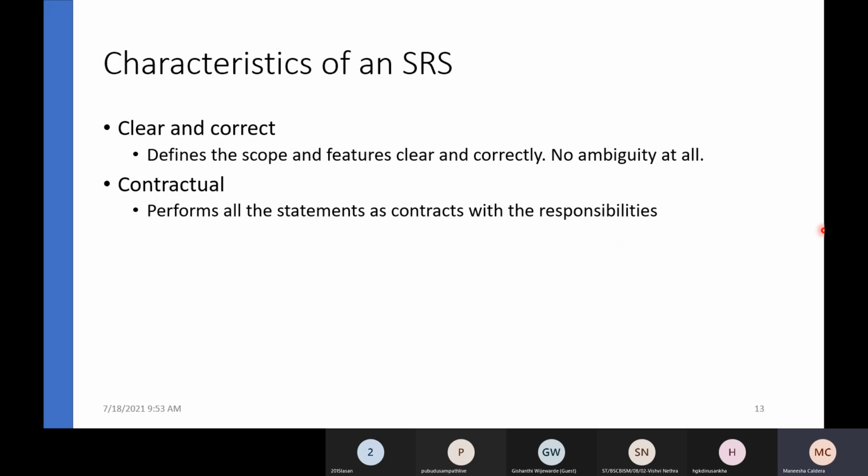As a client company, I agree to pay this much after completing 10%. As a client, I would like to have the user acceptance test on this day, and I just want 8 hours to test it. It's a contract. Apart from the client and the contract, you can sometimes specify the job roles, not the names, job roles, because everyone plays a job role, not a person.